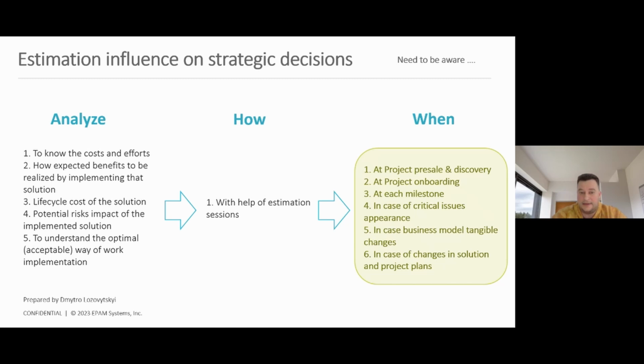And in the middle of this scheme, we have, with the help of estimation sessions, the question of when, the last part. At project pre-sale and discovery phase, the first point, at project onboarding, at each milestone, in case of critical issues appearance, this is a really often case. In case of tangible business model changes, in case of changes in solution and project plans. So we need to reuse our estimation techniques on a periodic basis when we face such things on our projects.